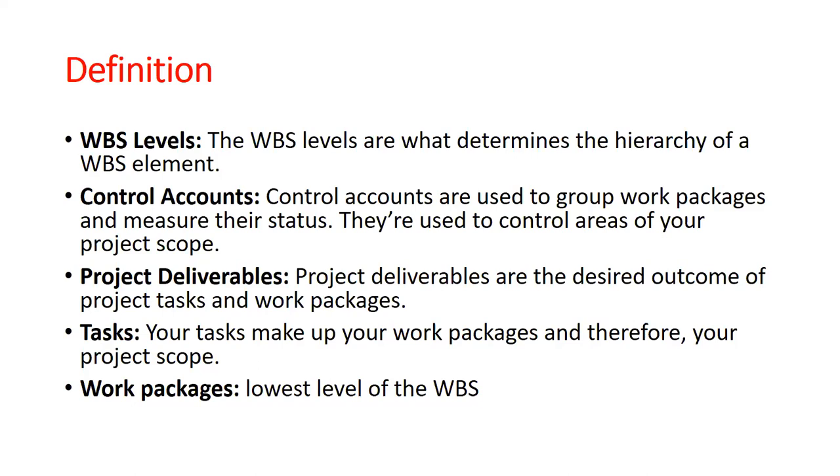If that is your level 2, level 3 will now mean that you have to come down to be more specific on who or what will be the criteria for choosing who will be the referral that will make you decide on the kind of professional body to go for. So that's the different levels. It gives you the breakdown from a higher level to lower levels until you get to the point that there is nothing else to break down.